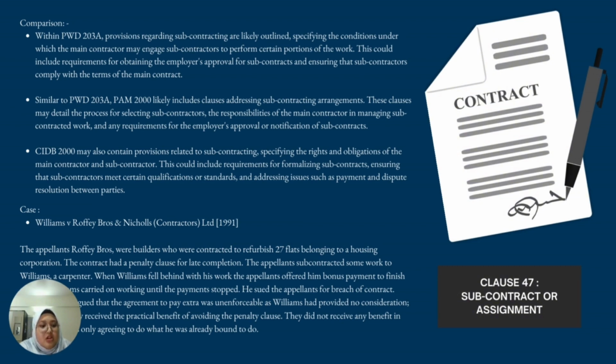The applicants argued that the agreement to pay extra was unenforceable as Williams had provided no consideration. The applicants only received the practical benefit of avoiding the penalty clause. They did not receive any benefit in law. Williams only agreed to do what he was already bound to do.